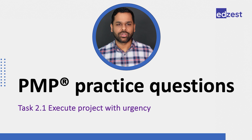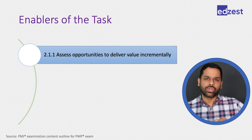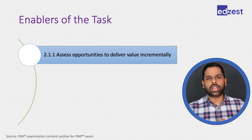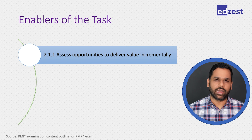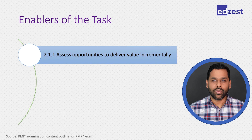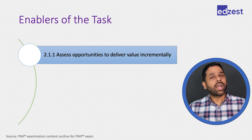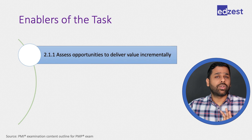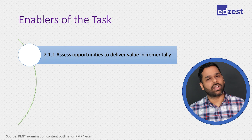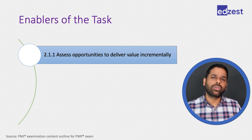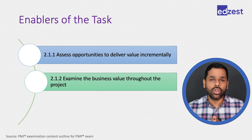For this particular task, the first enabler is to assess the opportunities to deliver value incrementally. We should always try to deliver certain value to the customer as early as possible. Incremental value delivery applies in agile, but also in traditional approaches — we can divide work into different phases so customers can start using it earlier, delivering incremental value through multiple approaches.